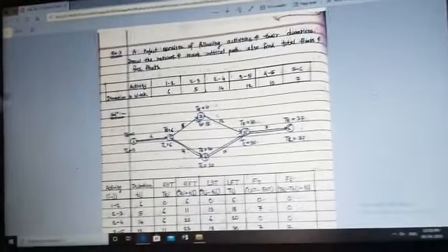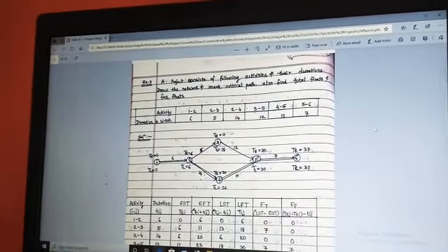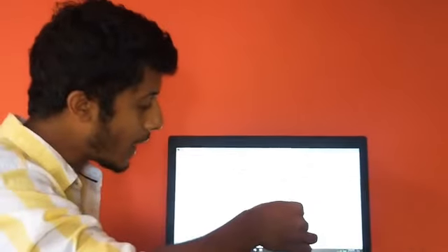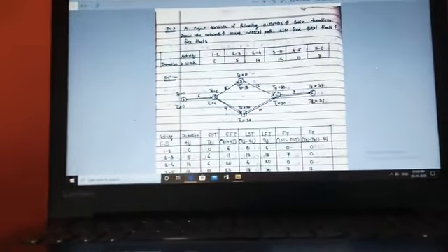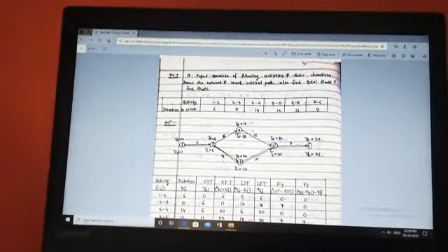Now if you compare the total duration we got for the first way and for the second way, which one is the highest? Obviously it is 37 weeks. Because of this reason, the critical path of this construction management activity will be 1 to 2, 2 to 4, 4 to 5 and 5 to 6. I hope I made it very clear on what basis I decided this: it is based on the total duration in weeks given for each individual activity.